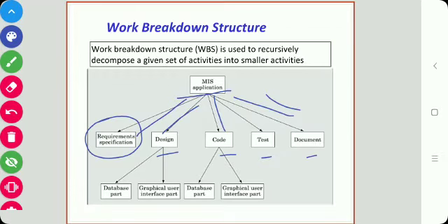While breaking down a large task into smaller subtasks, the manager has to make some hard decisions. If the task is broken down into a large number of very small activities, then these can be distributed to a large number of engineers so that our task is completed faster and we can perform parallel activities. If the activity ordering permits, the solutions can be carried out independently.